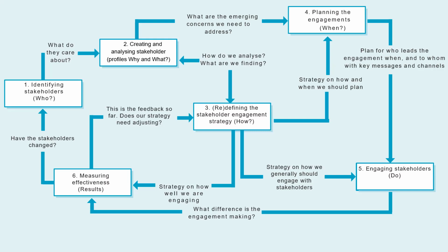Pankaj, are there specific tools for measuring the effectiveness of this exercise? Look, for effectiveness we can only look at conflicts, the issue log, the risks, primarily the issue log. See, to measure the effectiveness of stakeholder engagement, it's a very human or interpersonal thing, a people kind of thing. So the issue log is the only way you can do it. For example, counting the number of issues because of stakeholder conflict can tell you how effective your current stakeholder engagement is.